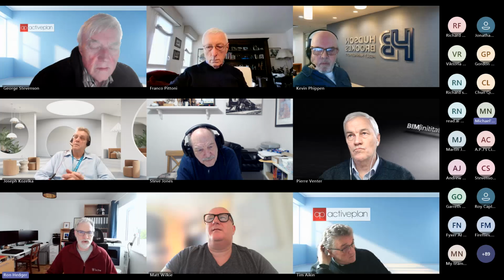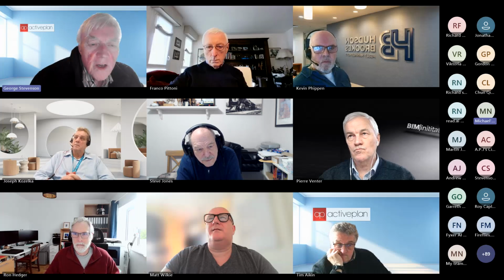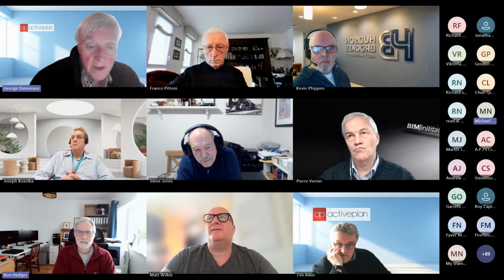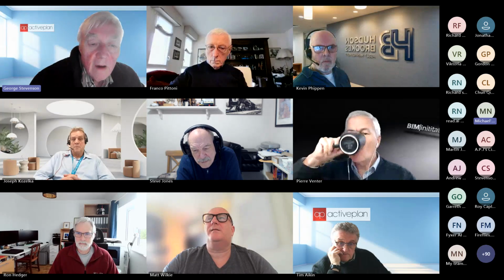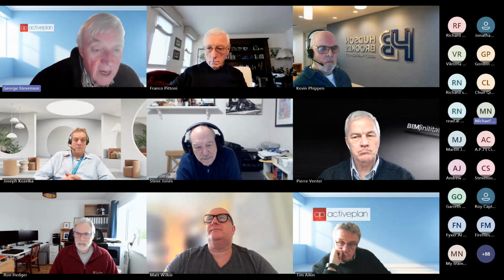So it's quite reasonable that that's not the case, but all of those changes must be recorded, otherwise the fire strategy evaporates. Ron, if I could just question that. You're absolutely the expert, that's why I've asked you to be here. But I question what you've just said, because Regulation 38 isn't only about receiving information, it's also the duty of care of the responsible person that's having work carried out to provide the contractor with the information that they need to ensure that the work's going to be safe. Am I wrong about that?